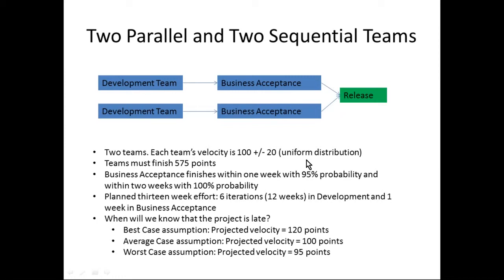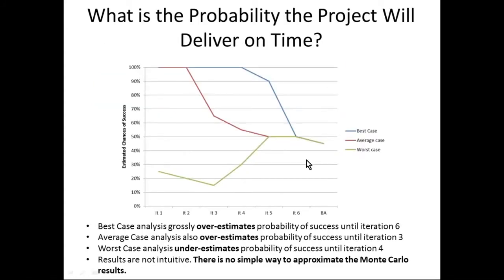Looking at the data: the right answer is on the right-hand side of the chart. In this situation, there's a 45% chance that this project will finish on time. You can see from that answer that the standard planning approach is never going to give you that answer — it doesn't produce a probability of success. And what this chart also shows is that standard Agile techniques looking at best case, average case, and worst case are all way off the right answer until you're well into the project and have spent a lot of money on something likely to fail.